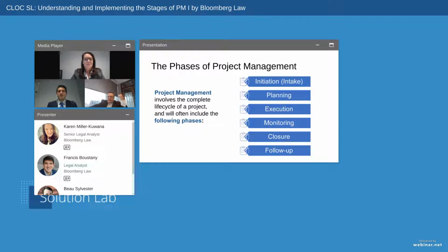The other thing I will tell you is do not underestimate that initiation and intake, because so many people don't have intake for their project work. They think about intake from a matter management standpoint: we'll get it so the lawyers know what work's coming in. If you don't have it from a project standpoint, depending on the size of your operation, what's going to end up happening a lot of times is you're going to find that there's a lot of duplication of work going on, that you'll have 3 people actually working on the same problem statement. So really having a good initiation and intake is the key to starting any project. Getting that problem statement defined, setting the tone from the top. Make sure you have the buy-in from the leadership.